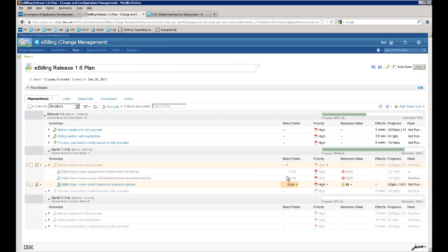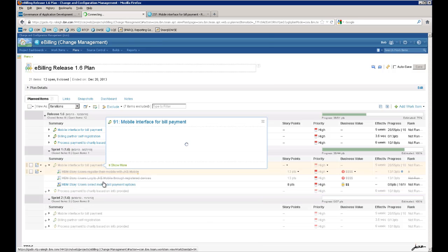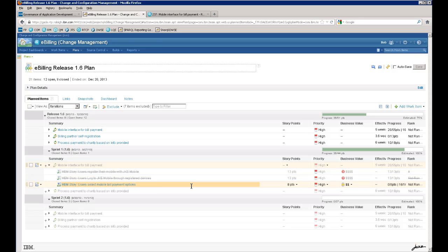In an outsourcing situation, the supplier may not perform all the work here in RTC. They may have their own development environment elsewhere, but the expectation is that they will break the work items down into stories and keep these high-level work items updated with current implementation status. Where teams do perform more work directly in RTC, the progress data is of course that much richer.